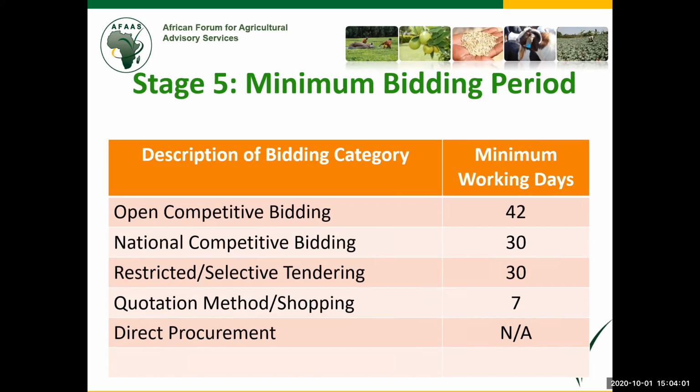So what is your reflection on that? So other countries also can learn. I think because of the internal policy that is created within the CF, it is acceptable because you are seeing in this spreadsheet, in this screen, that even restricted tendering can be done. So you are restricting first the country fora. If you don't see capacity, you jump out.